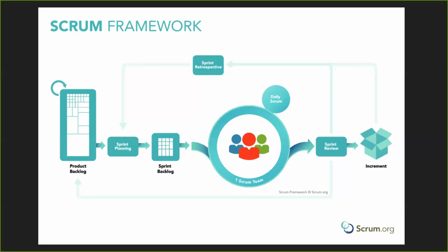But another key thing is that your stakeholders or your users cannot add or remove anything to the sprint during the sprint. Because that's another thing that you run into issues with, is that every time you make a change, they're like, well, can you tweak this? Can you tweak that? And then you still get this thing where you're going off on left field. It's just in a different path.